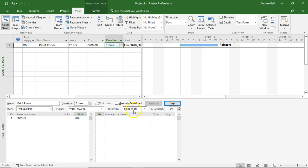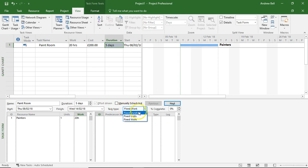Go and have a look at the blog on different project management task types. Some task types are fixed duration, some are fixed units, some are fixed work.